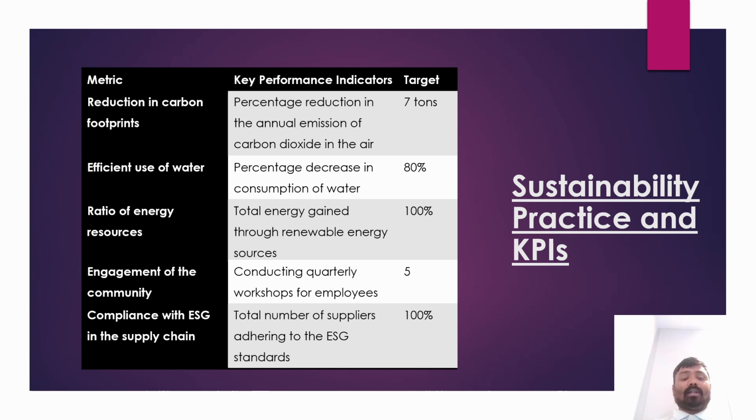I wrapped up the map. 3 major lessons emerged. First, early visualization avoids rework. Sketching high-level swim lanes in the first week exposed missing decision gates before we had built anything. Second, integrate ESG from day one. Embedding sustainability criteria in charter, contract, and approval means it wasn't an afterthought. It was baked into every milestone.